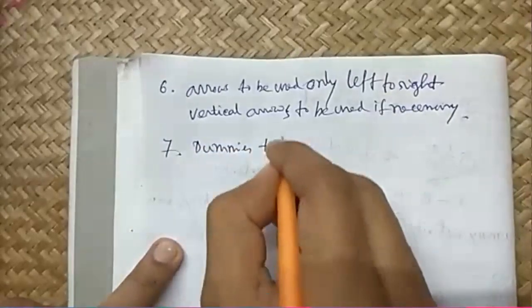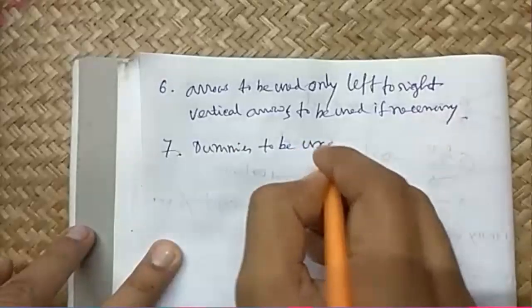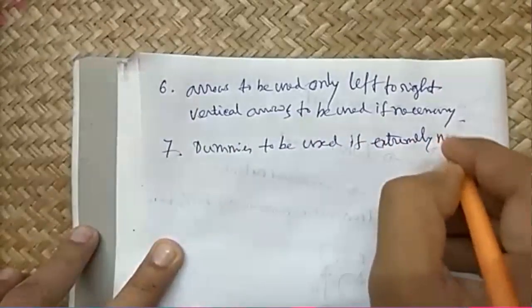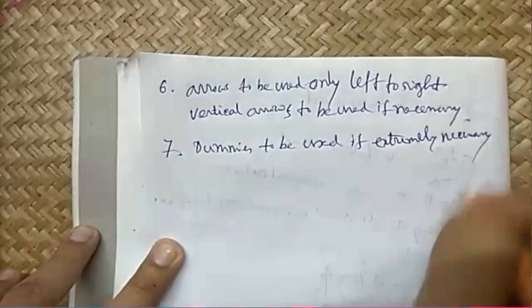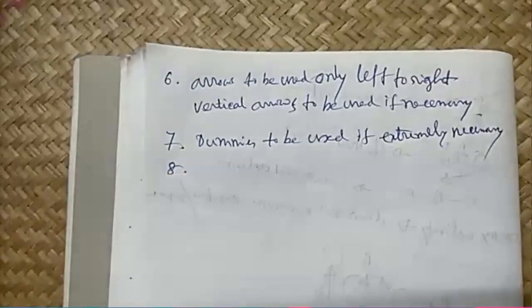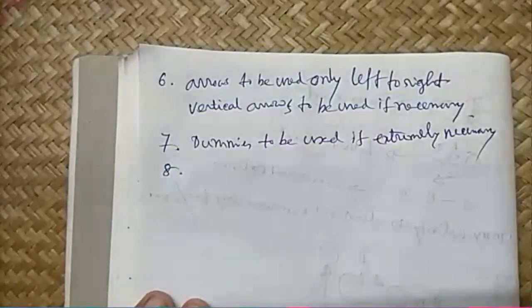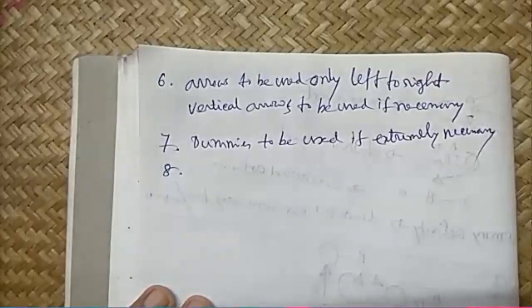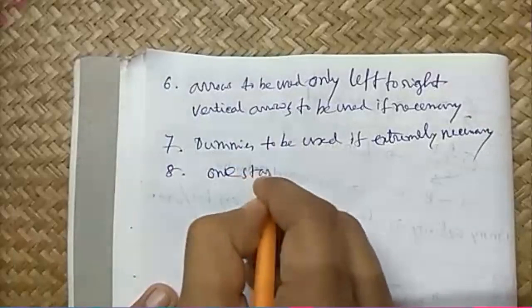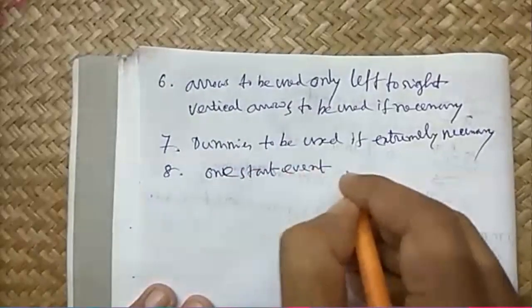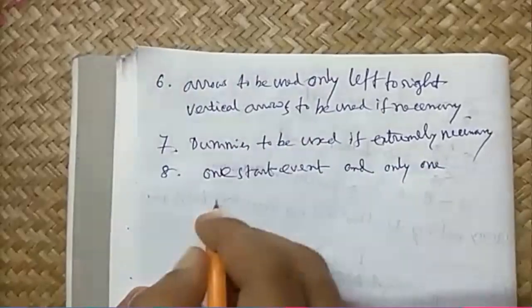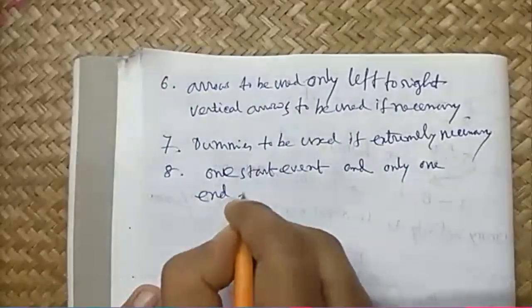Dummies to be used if extremely necessary. Using of dummy is very rare. And the last one, the network has only one start event and only one end or terminal event.